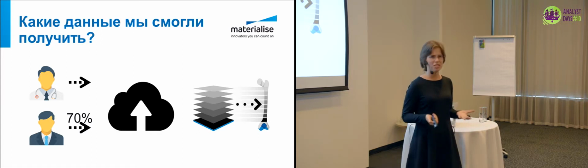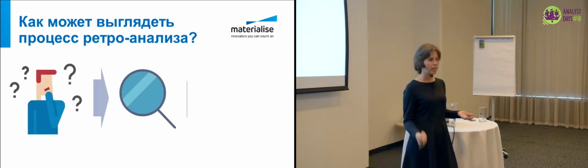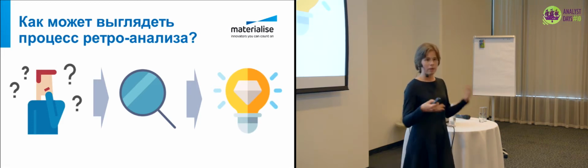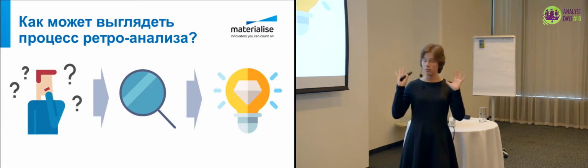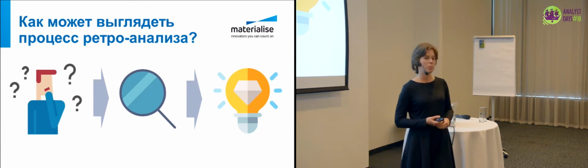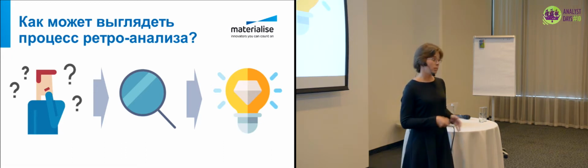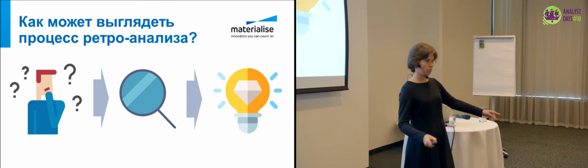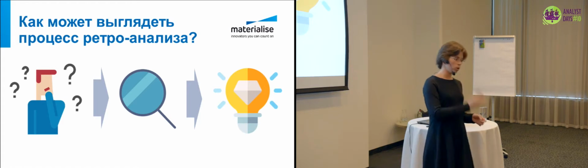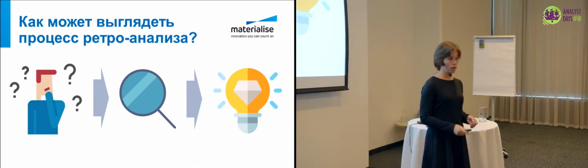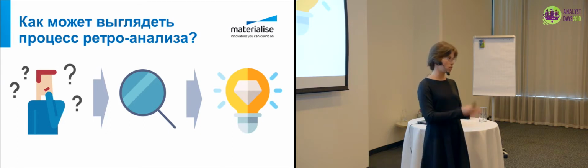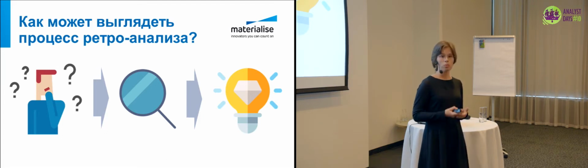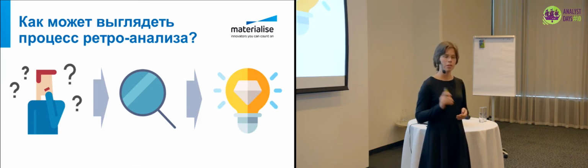But let's think whether our analysis was systemic. What happened? We had a problem. We started to look inside this problem, inside ourselves. We drew some conclusions. We got some ideas. We checked it, and this is not systemic. We decided that systemic means regularity. Let's plan that after the end of each project, after one month, let's make a retrospective analysis, checking whether our current project was successful.